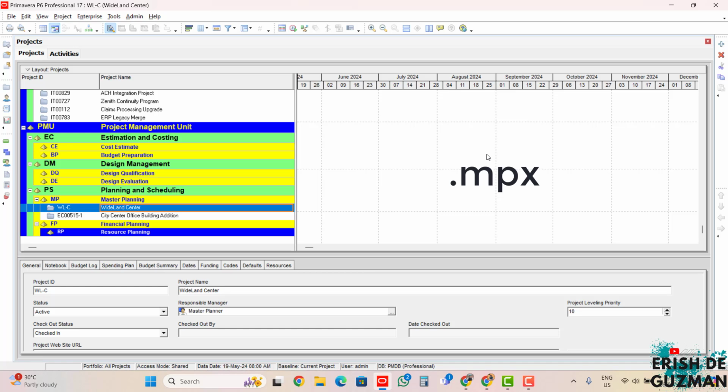And one is Primavera. Next is what we call the Microsoft Project XML format. This format is supported in version 6.2 and later versions. Microsoft Project XML format allows importing of a file which has been created by Microsoft Project version 2010 or 2007 or 2000 to 2003, unlike the .mpp format, which is available only to Microsoft Project from version 2000 to 2003. And this process can happen even without the installation of Microsoft Project.